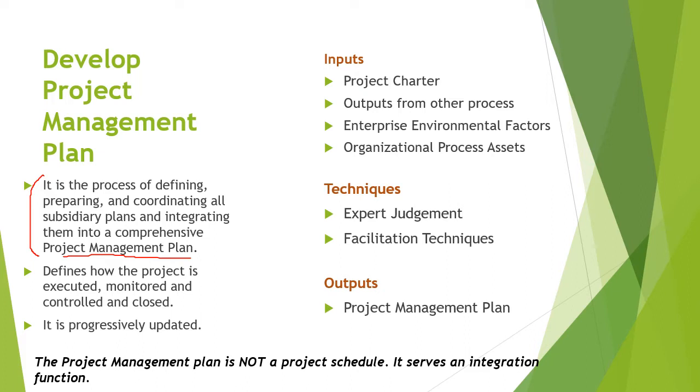Another important concept is that the project management plan is progressively updated. This plan is continuously developed, refined, revisited, and updated throughout the project life, because as we accept any changes during the project, the first document that we need to revisit and update is the project management plan, right?